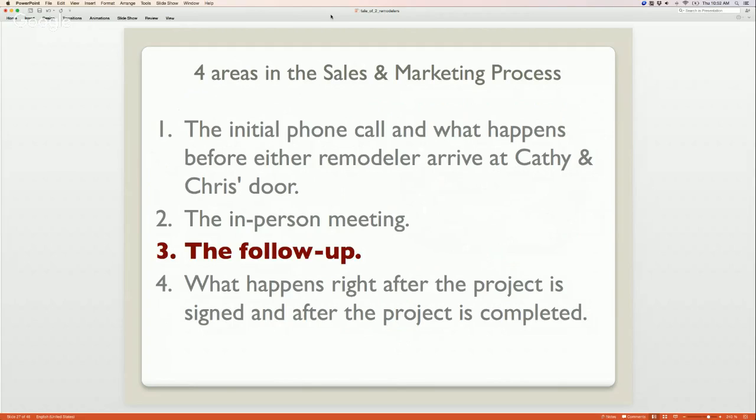It may not be perfect the first time around, but you could write it out. This is what you need to cover with your lead carpenter. This is what you need to cover with the homeowners. You need to talk about where you use the bathroom, what's going to happen with the pets, and where you're going to park. Where can we put the dump truck, right? All that stuff. There's nothing that complex about it.